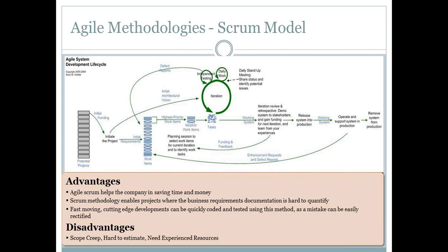You generally tend to have a Scrum master who would handle the role of a coordinator or project manager in this project. The way it executes is, you identify the project and look at the functionality or the features of the system. Then you break it down into work buckets or work items as we call them, with each work item providing a feature of the system. A thumb rule would be you take a week or 2 weeks of work to create a work item.